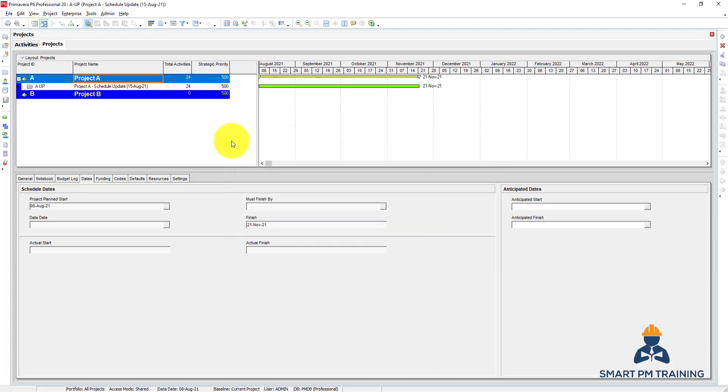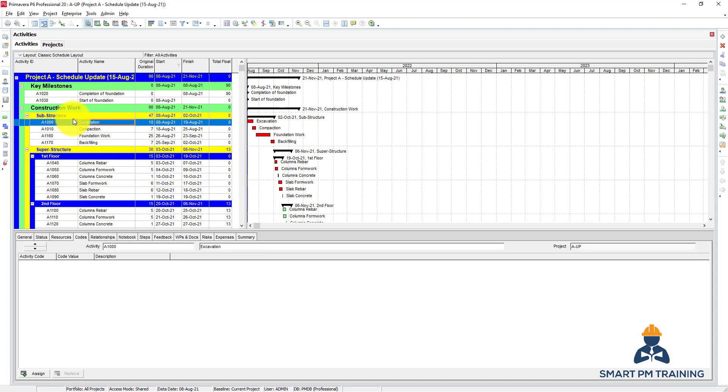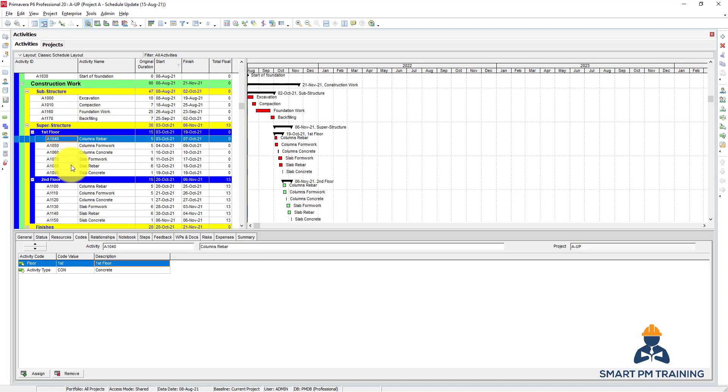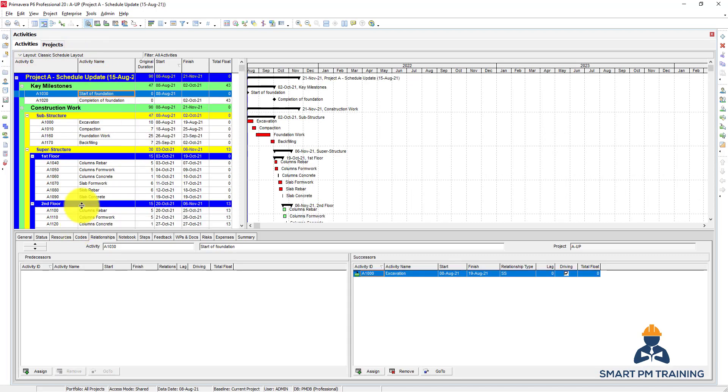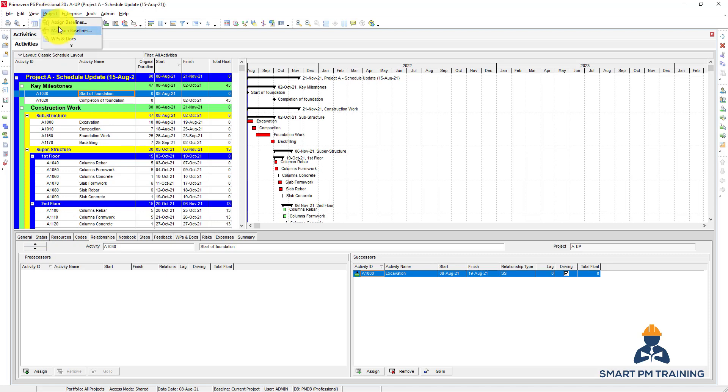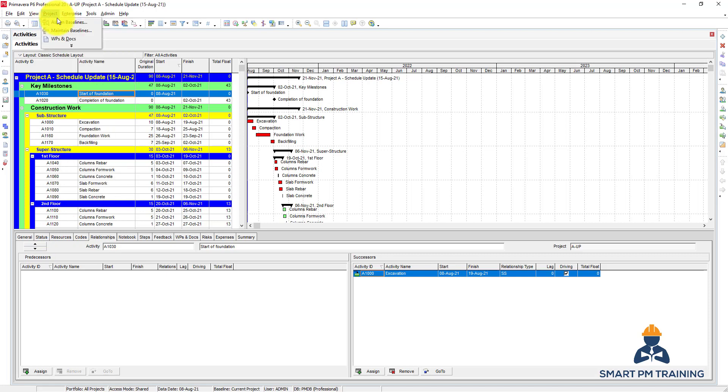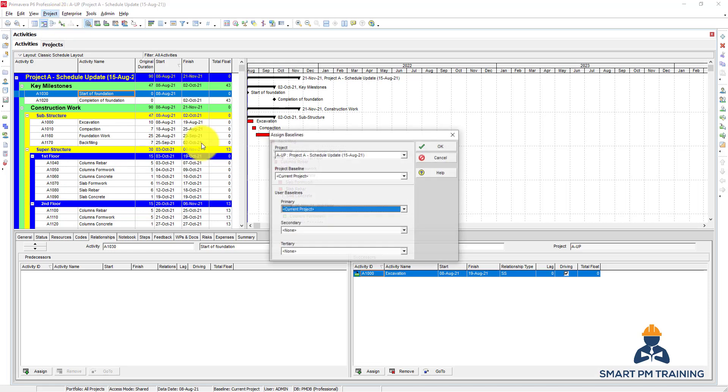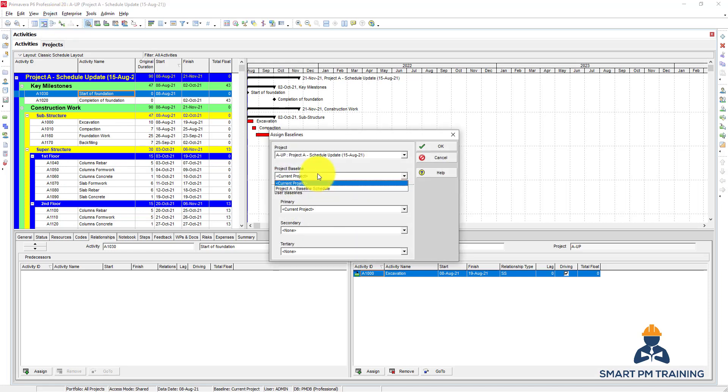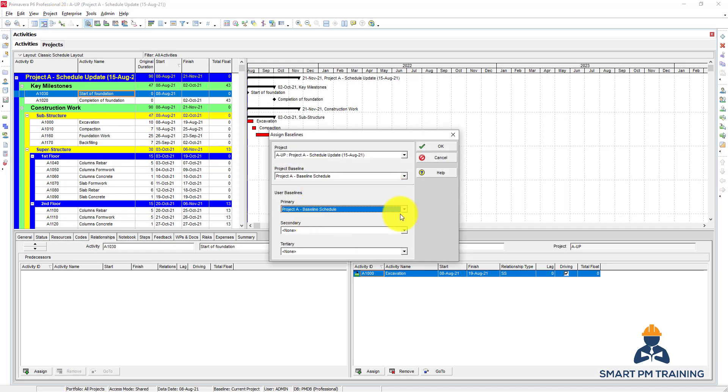Then Close. So now you can add as many baselines as you want. Let's assume that this is a start. I added the baseline. Next step is to assign the baseline, so I go to Assign Baseline and I choose the one I added right now. Now you have a baseline assigned into your project.